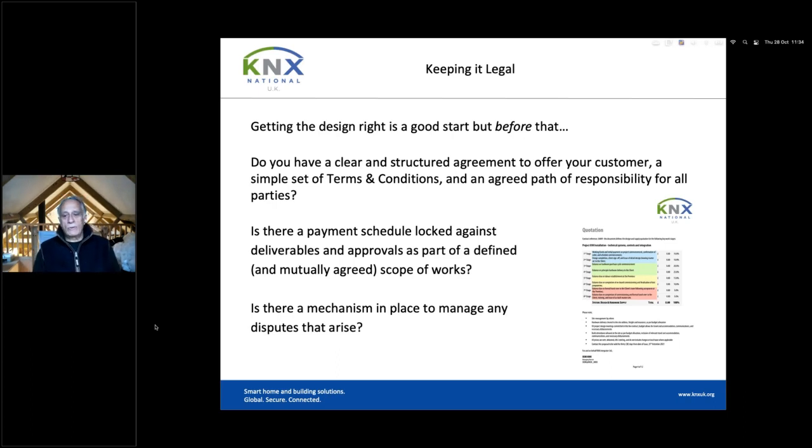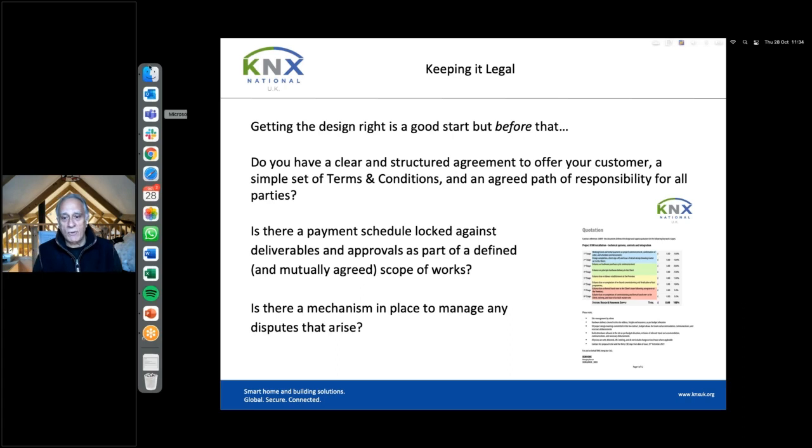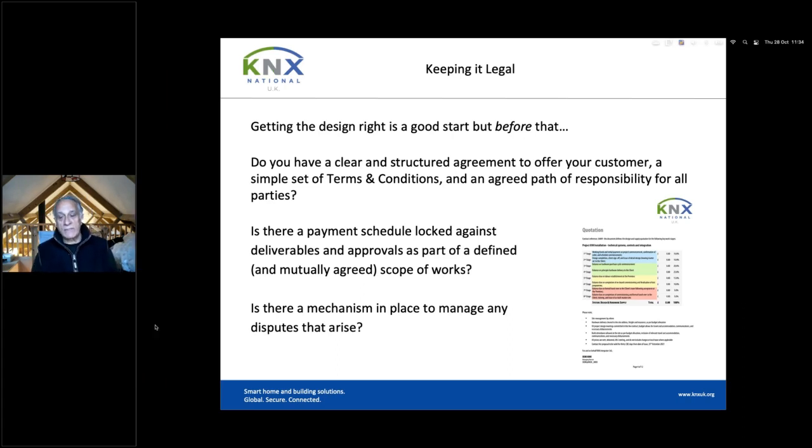The payment schedule will underline what has to be paid when. It's important to issue a valuation at that point, along with the invoice, and that must align with the schedule or the schedule as it's been updated by any changes to the works. This will then go on to provide a portfolio of documentation for the whole of the job. At the same time as the billing is raised, assessments can be made for any additional costs or the impact of delays.